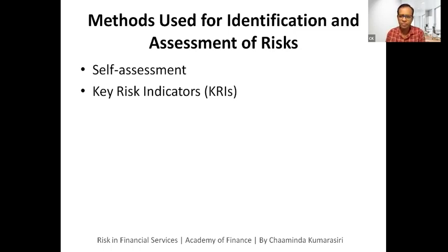Likewise, you can identify different criteria as key risk indicators, define the critical levels of those indicators, and based on that, identify and assess the risk.